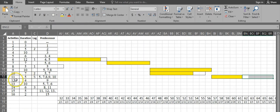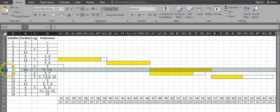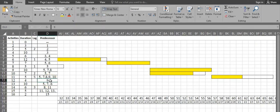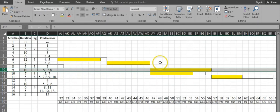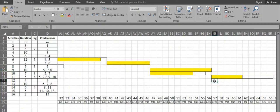Activity 12 has a duration of 4 days and predecessor is activity 9. Activity 9 is here, so activity 12 starts from day 57 and has a duration of 4 days: 1, 2, 3, 4.